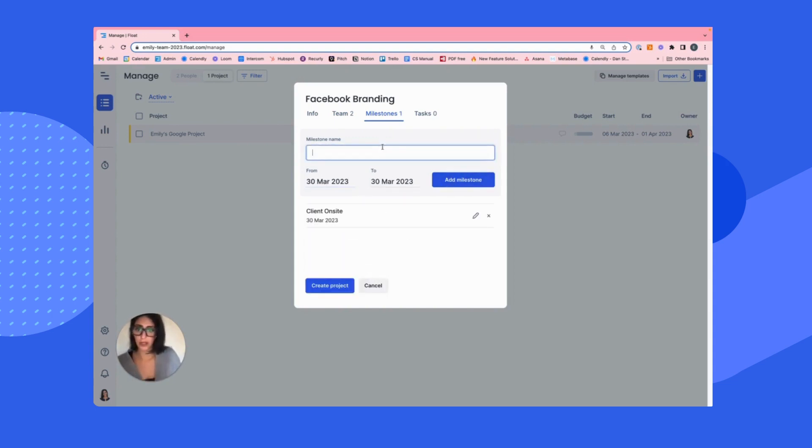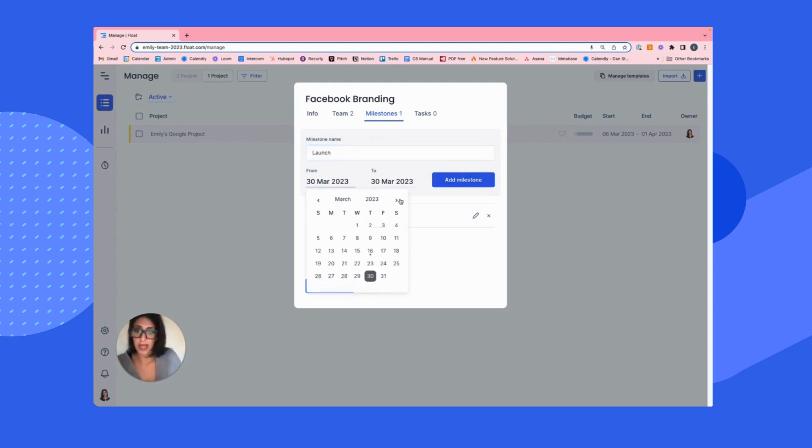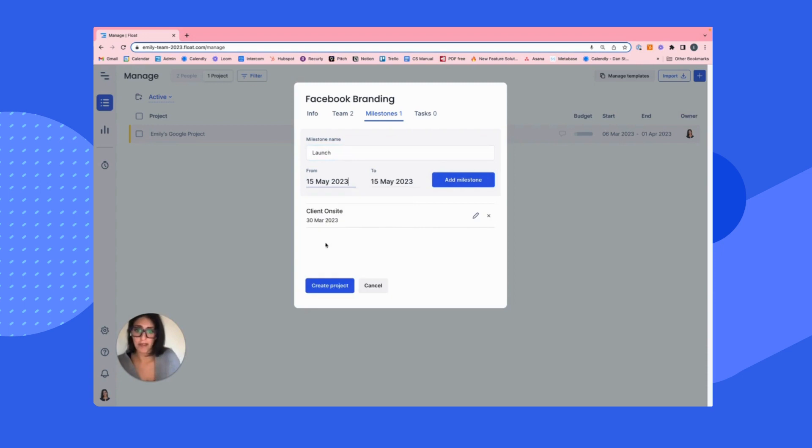We'll add that milestone and the launch we talked about was in May. So let's add a nice launch date. Maybe the 15th, we'll add that as well.